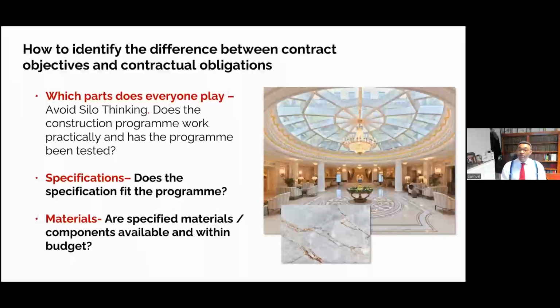And when, of course, they presented samples and the lady of the house chose what tiles she required, the tiles had to come from Spain, and they were on a 16-week turnaround. Now, that's a potential 16 weeks delay on the project. How has this been articulated, integrated? Is it understood what the consequences will be? Has it been mutually acknowledged and therefore accepted that the project can be delayed for 16 weeks?